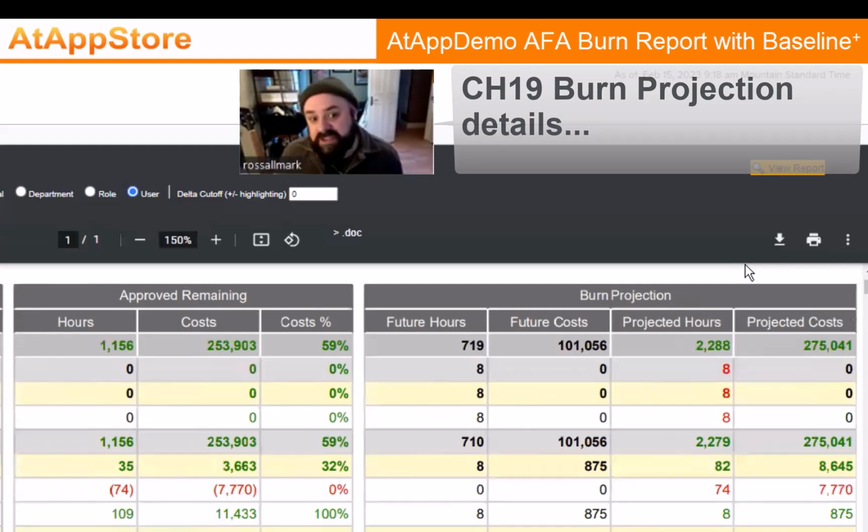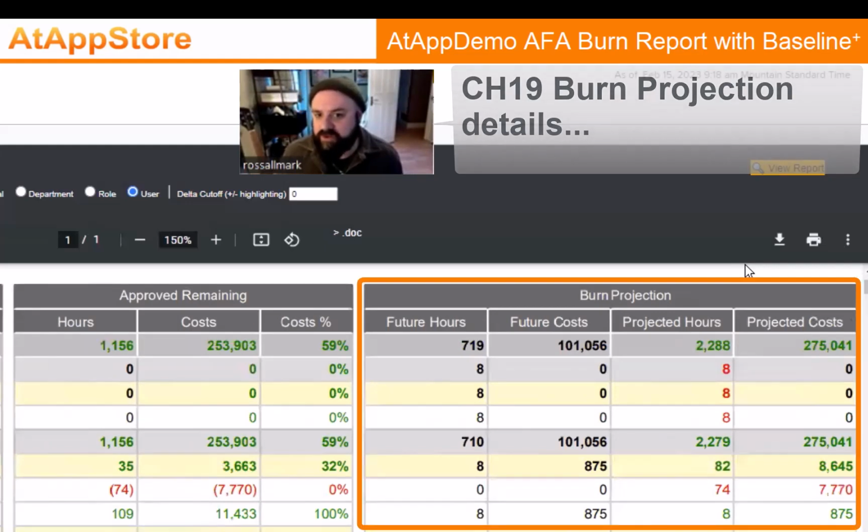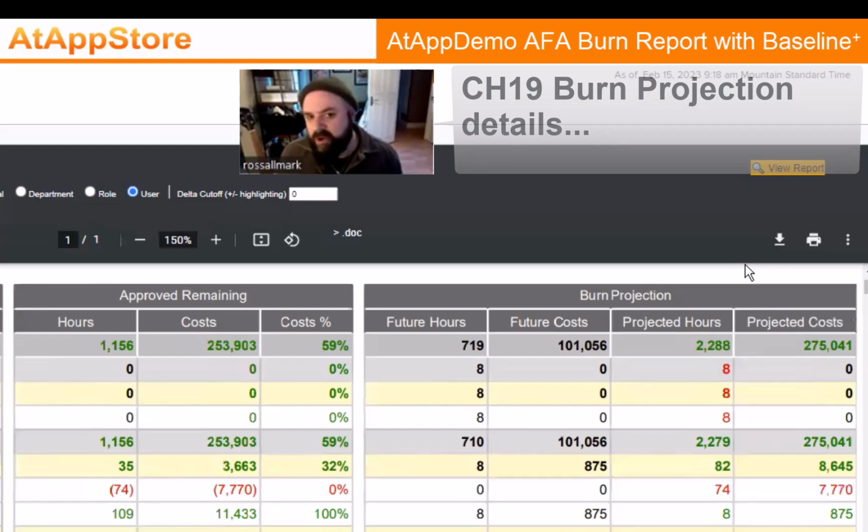But when we did some testing with this, what we actually realized is that we needed to make a bit more of a projection about the future that people could really believe in and was trustworthy. And now for us, basically the most trustworthy projection was going to come from what has been tracked on timesheets to date. So that is approved by the manager of the individual, etc. And they have logged, this is what I really did. And they are not incentivized to lie there. So we know that there's a bit of a wisdom of crowds situation. So they're going to put that in there.